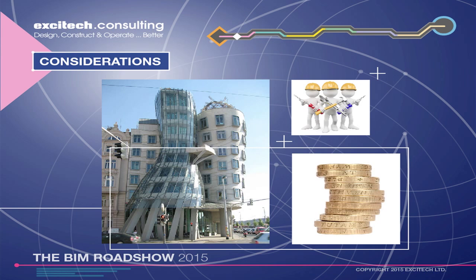Okay, so we've carried out a survey on the client's existing building, and we know, due to the extension restrictions, we are able to go with a new build. I have confidence that the contractors are available and they can meet the agreed timescales. I still need to consider whether we're going to go with a concrete frame or a steel frame, and I need to acquire costs from the contractors for both options. I mentioned earlier that I'm looking at minimizing risk for the client. The risk I'm thinking of at this moment is if the client was to downsize and sell in the future, what's the target market if the building was sold on? So I'm having conversations with real estate agents in the area to understand the demand for different types of buildings in the vicinity.